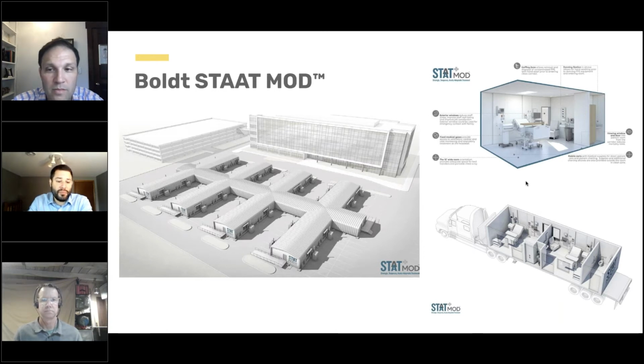And then when it's on the job site, we're also taking daily site walks so we can see the status of the foundations that are being built in advance of these mods being delivered. Now that they're on site, we're doing walks daily as well on the inside of the building so we can have that transparency. Everyone knows the status. This owner is never coming up to our fabrication facility, but they knew everything that was going on.